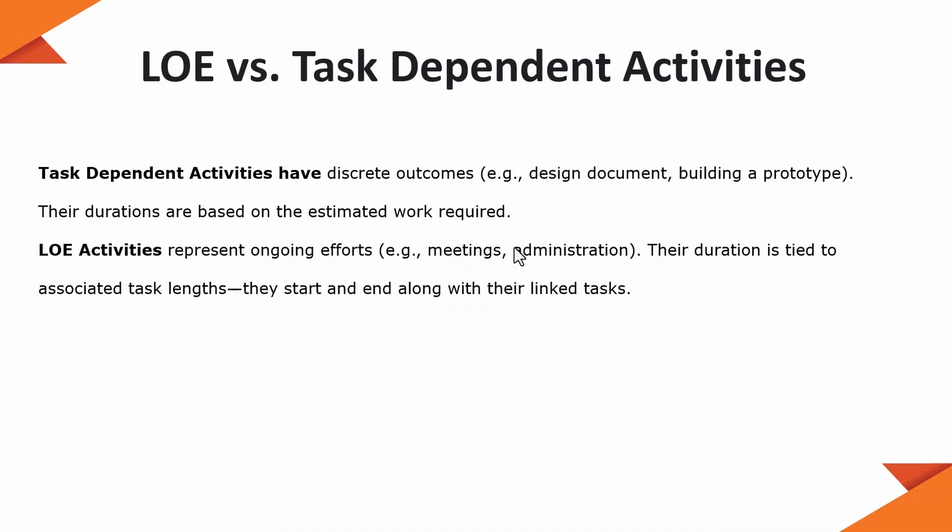Let's understand the difference between task-dependent and level of effort tasks. Task-dependent tasks have discrete outcomes — particular deliverables like design documents, a building prototype, or completion of a building — and their duration is based on the estimated work required. Level of effort, on the other hand, represents an ongoing effort like meetings, budget management, or administration tasks that act as enablers for completing those task-dependent activities. The duration is tied to the associated tasks' length.